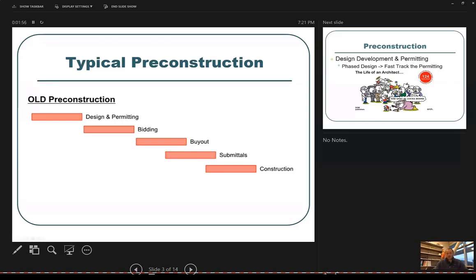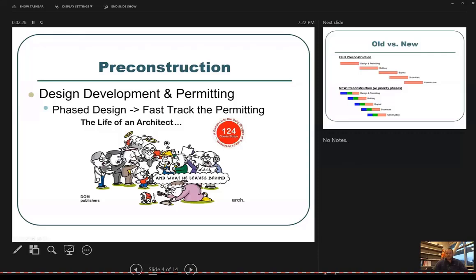So submittals are the documentation that they have to submit prior to installing it on site. Structural steel is a good one to think about. They submit this beam, or this column or brace behind me on a sheet of paper showing the calcs or whatever they need to. Get it approved by, this one's probably a deferred submittal, so it goes to the city and the engineer, but it's got to get approved first before they install it on site. So that's a submittal, little refresher.